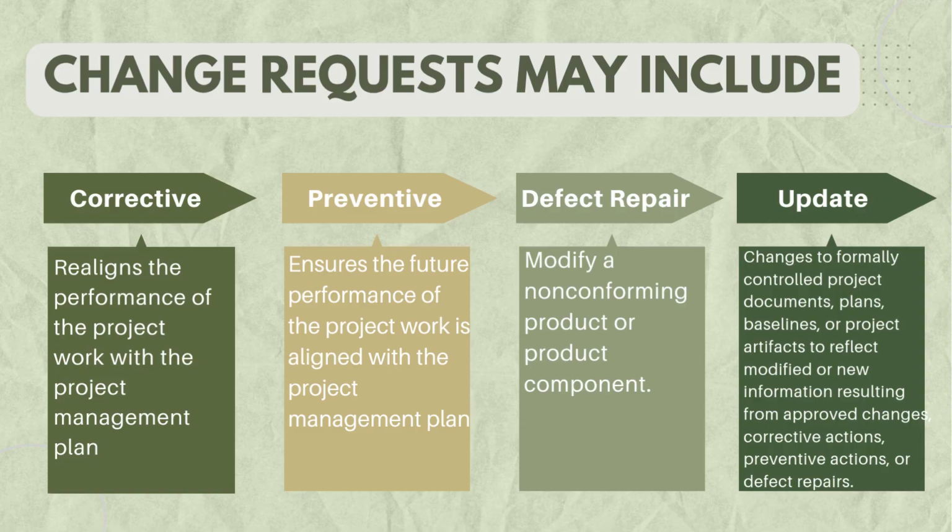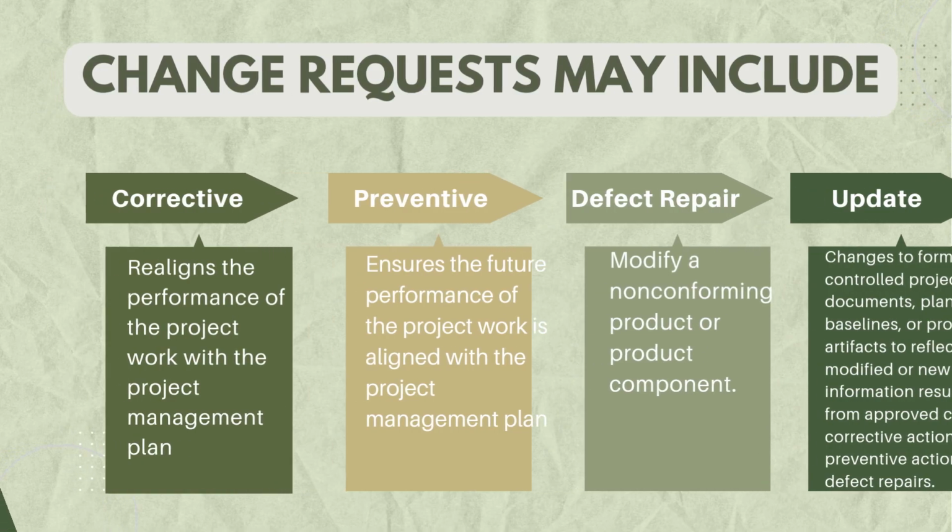The purpose of updates can be to ensure project records remain accurate and current, or else to reflect approved changes and actions taken, or maybe to keep all stakeholders informed and aligned. Examples of updates can be updates to the project management plan, like updating the schedule baseline after an approved change in timeline, or else updating project documents like revising the risk register after adding a new risk.